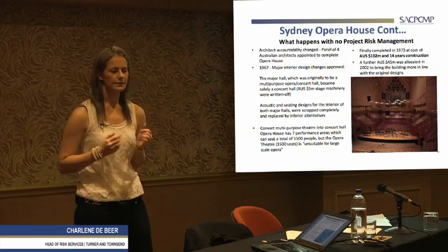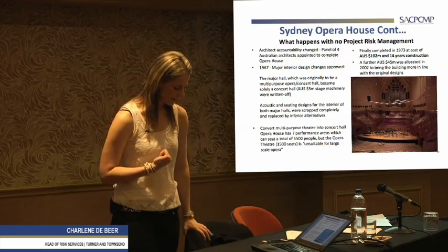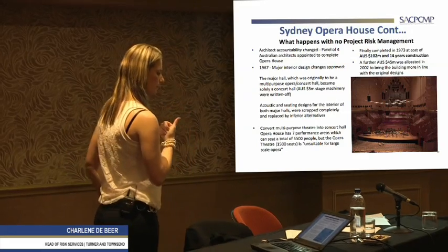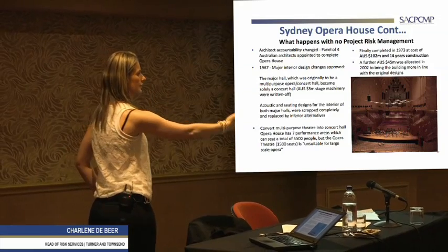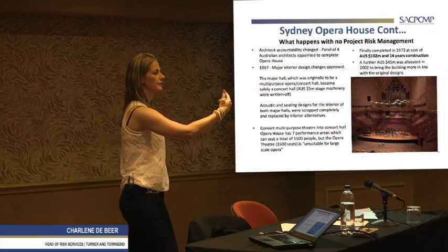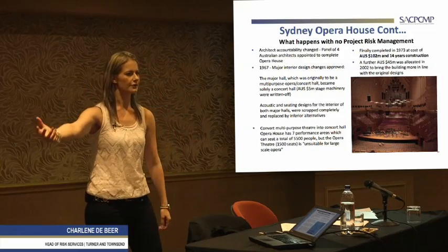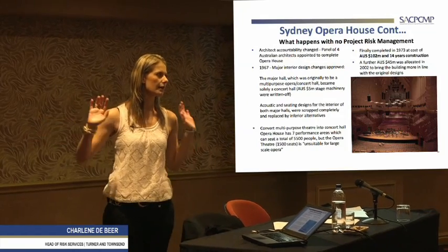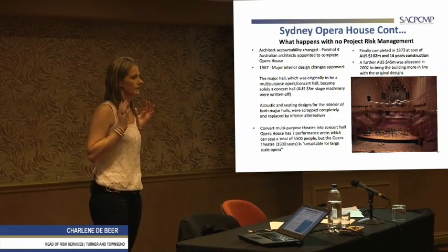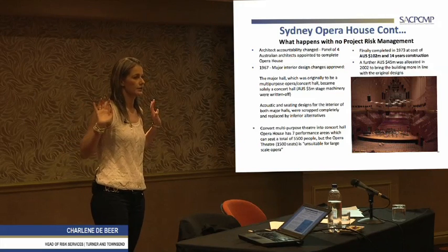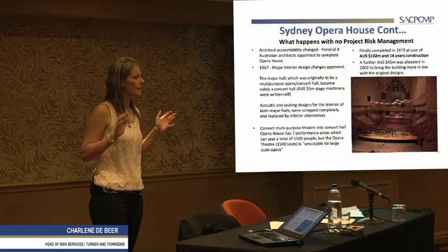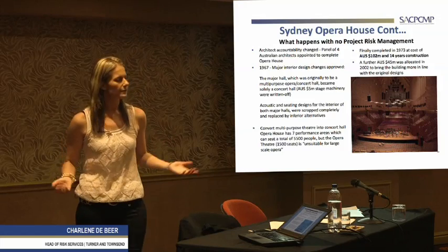Now, let's just think about that for a second. So firstly, the risk we now face is that we will not be able to hold that engineer liable anymore. Because as soon as another engineer touches his engineering or his design, he's going to say, well, if it fails in a few years, I'm not going to take responsibility because I don't know what the new engineer did. And it's a fair statement.